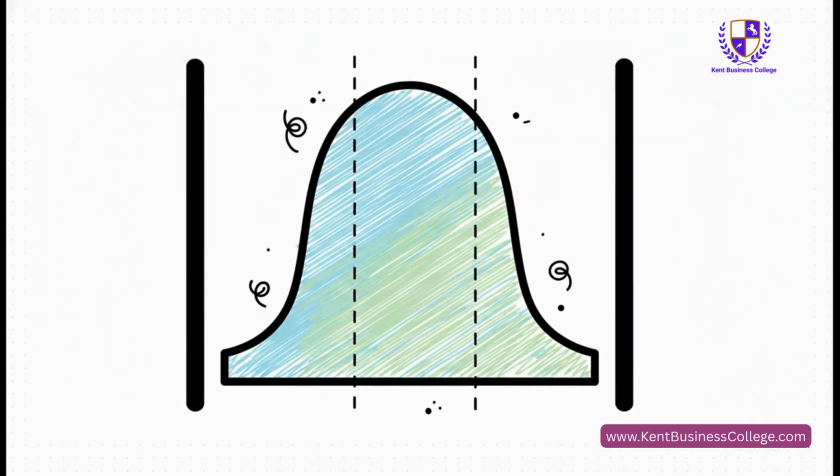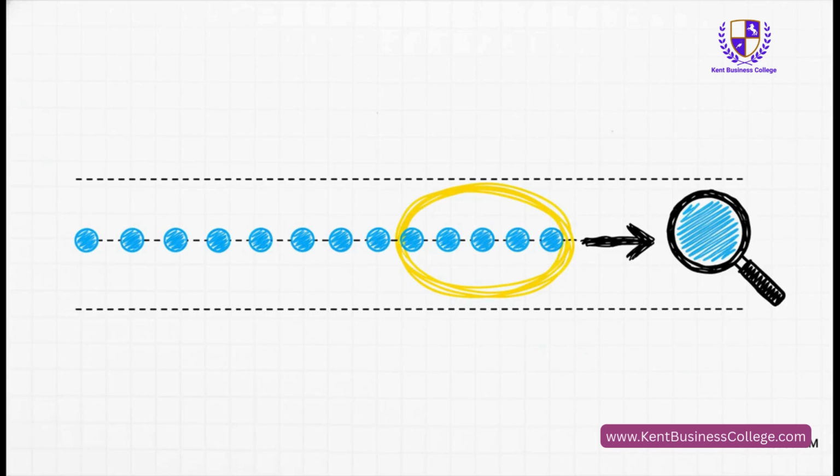Okay, another pair of terms that trips everyone up on the exam. Tolerances, that's the acceptable range set by your customer. It's their requirement. Control limits are totally different. They measure the natural statistical variation of your process. Your big goal is to have a process that's so stable and predictable that its control limits are way, way inside the customer's tolerances. And here's a specific one to watch out for on your exam: the rule of 7.